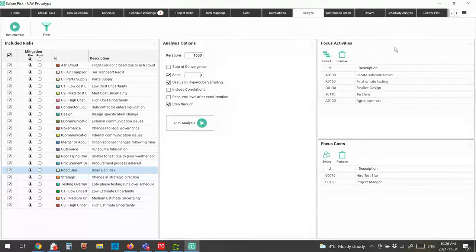In other words, when the project gets turned over to the owner. What I don't care about is site cleanup, demobilization, all that kind of stuff, because that's not putting my budget at risk. Yes, it has to be done, but if I've turned the plant over, if it takes me a month to do site cleanup or 6 weeks, it's not really going to be a huge issue from the perspective of when do I deliver this thing.